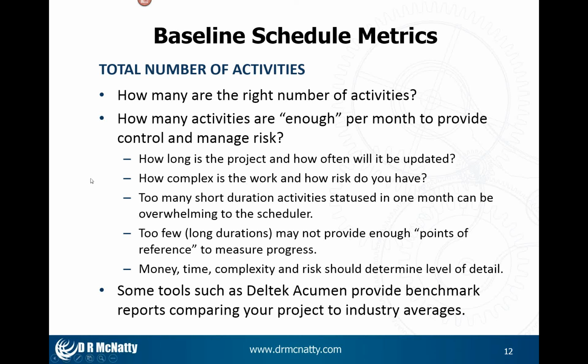So the things that we want to look at is, how long is the project, how many updates are there going to be, how complex is the work, how much risk do you have. There's really no set, cut and dried figure that if it's this much money for this much of a period of time, you should have this many activities. There are some tools like Deltek Acumen, which maintains on the cloud a database of benchmark information that you can compare your schedule to, to see whether you are more detailed or less detailed than what the average schedule is within your particular market.